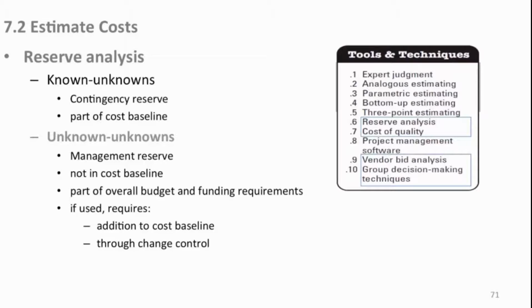Now remember, management funds are rather unprotected. They're not part of your official project budget. So who knows who's going to come along and take that money from you, because it will not directly affect your project at all if it goes away, unless you have an unknown risk event occur, and then you're using your real project funds, taking them away from other things that have earmarked those funds, and you're using those funds instead of management reserves. So you do need some management reserves, and it's up to you as project managers to protect that money.